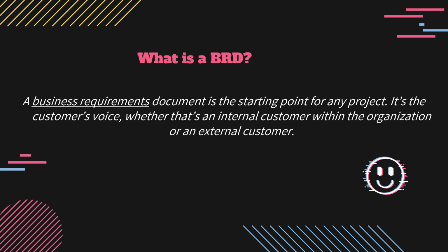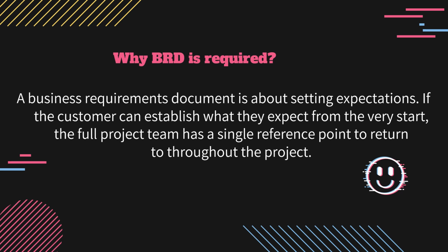Okay, let's start with an explanation of what a BRD is. A business requirements document is the starting point for any project. It is the customer's voice, whether that's an internal customer within the organization or an external customer. The business requirements document outlines the customer's needs and expectations. It doesn't specify how a project will be carried out. That gets outlined in the functional requirements document. But it does explain why the project is needed and what the customer hopes to see once the project is complete.